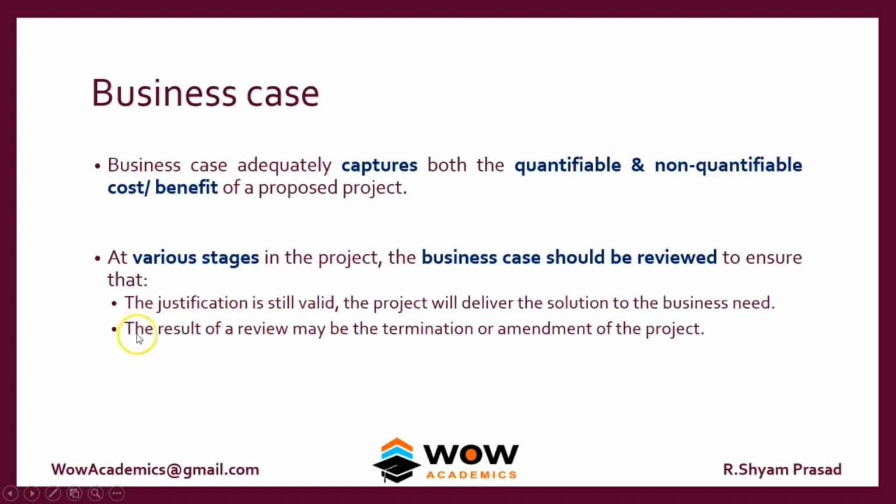It can also be used as the result of a review, maybe the termination or amendment of the project. So every time we compare the actual execution of the project, we have to compare it with the business case. And if the business case is not valid, assume that we want to create software, and while creating it we find out that the cost of the project is going to be much higher than what is said in the business case. In such cases, we could either terminate the entire software creation project, or we can change it. So a business case is a base document based upon which we compare how the progress of the project is going.